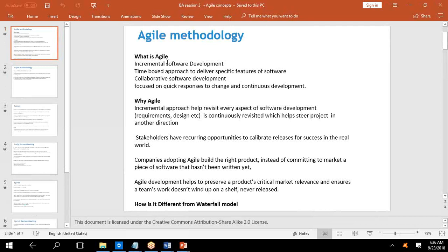There is one more step after that called analysis and modeling. That is when you will get detailed requirements. Then these models will be more understandable and will make more sense. Even then, you will not get into design at all. So it is up to the point of how much detail you do, and that's what is required for you as a BA. What is the model? How much detailed requirement should I do? If it is waterfall, you do detailed requirements. If it is iterative, you do detailed requirements for 80% of your major requirements. If it is agile, you will not do detailed requirements. You will always keep high level. You will do detailed requirements only during development.